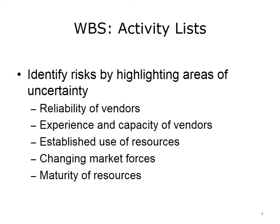You will be able to identify many project risks simply by examining these work packages and activity lists to uncover areas of uncertainty. As an example, an activity list may indicate that a specific software package will be integrated into the evolving system. What is the risk of using that software in the intended way? Is this a mature product? Is there a large installed base of users? Is the product being used in ways similar to how it will be used on your project? Have you heard that the vendor will be acquired by a larger company, and if so, how will that affect your project?